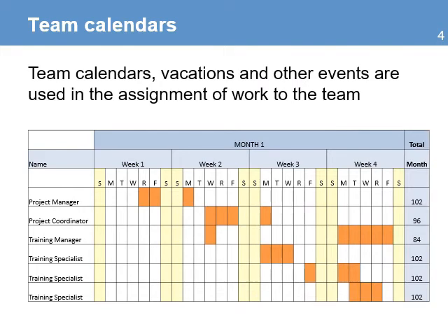The first information you need comes from the team calendars. This is information that each team member completes to identify the days they will take as vacation, training, and other activities where they will not be available. Each one of your team members must complete this information and select the dates when they are going to be taking vacations or they are not going to be available to work on the project.